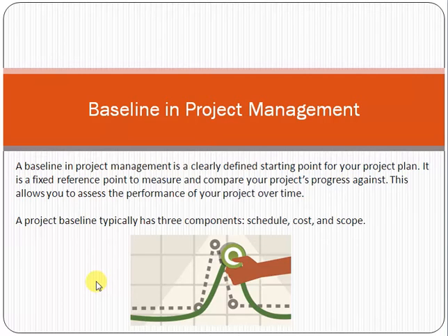Now, after 2 months, once you evaluate the things, you find that already $3,000 cost has been incurred, and the project is not going on the right track. Why? Because, friends, if you are spending more than what you have planned, or taking more time than what you have planned, that means you are not on the right track. That means you have to take corrective action.